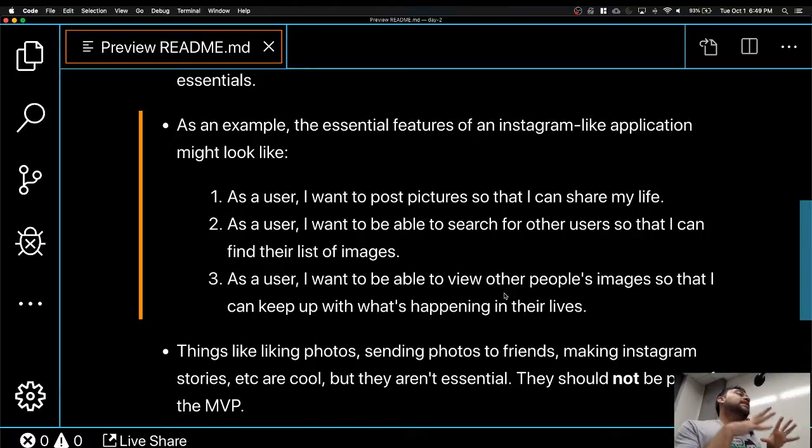Okay, your task or your user story should be small enough that it can be completed in at most a day. If you think your user story is going to take more than a day, then it's too big. It has to be broken down into a smaller piece. Let's suppose I'm creating the search page. I have an input box where somebody is going to type something and a button, right? I'm in my initial HTML. It's going to take me, let's suppose, more than a day to complete this task. So what do we do? We break it down into this.